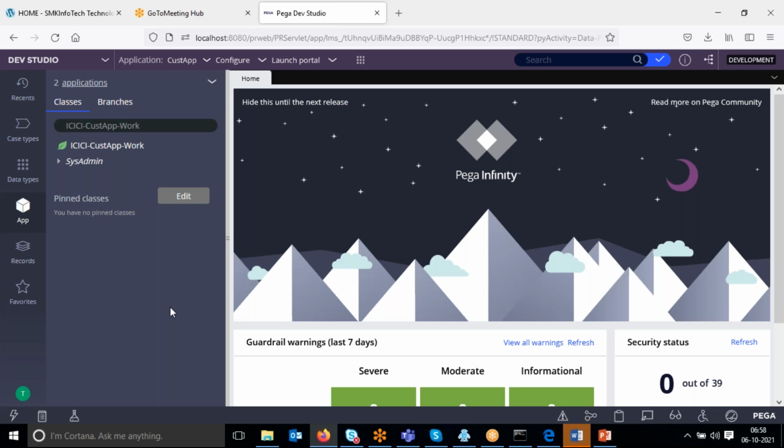Based on the requirement, as I told you, requirements will be in three categories: simple, medium, and complex. For a simple requirement, they will again categorize by presentation layer, business logic layer, and database layer. So to design one table, how much time is required? And to design one screen, how much time? Each screen level they'll define, not like I can give 20 days for the whole functionality. No, they won't accept that way.